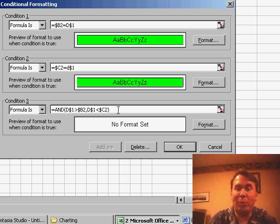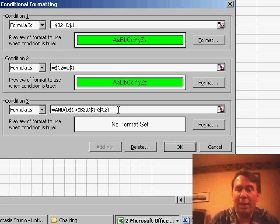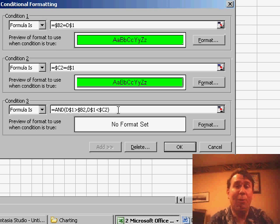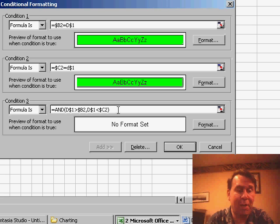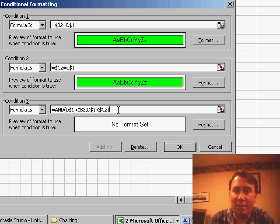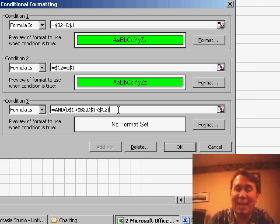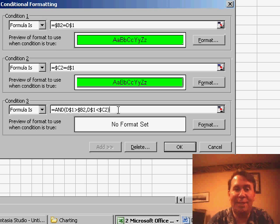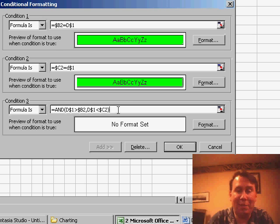So that's =AND(D$1 greater than $B2)—in other words, is this year greater than the start year—comma, and then the other piece of the AND is D$1 is less than $C2, the ending year.